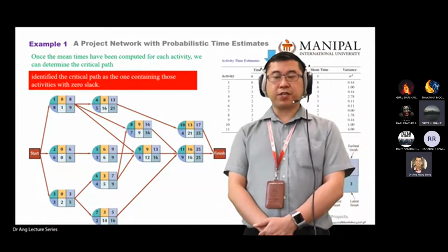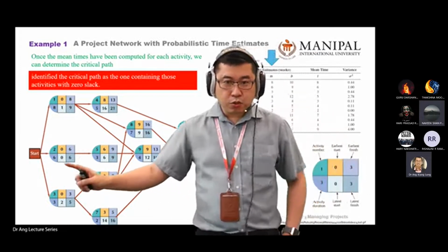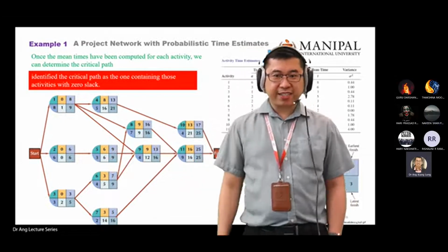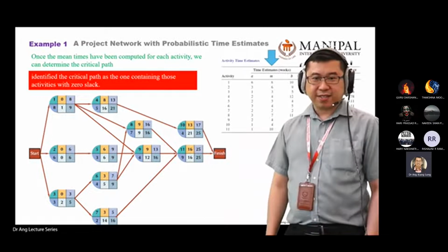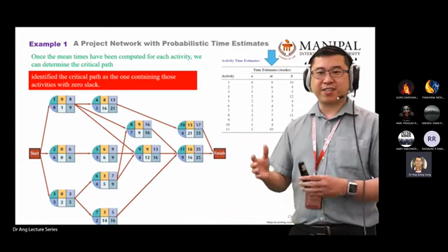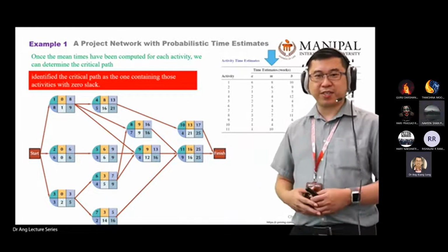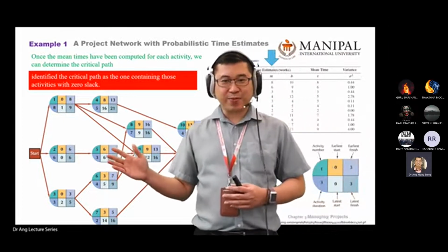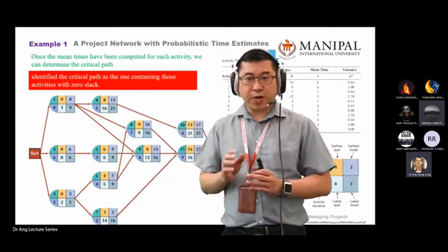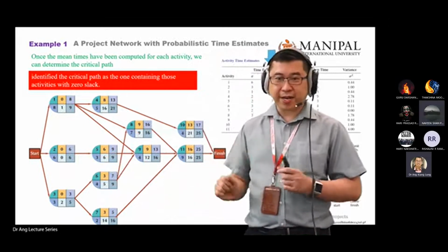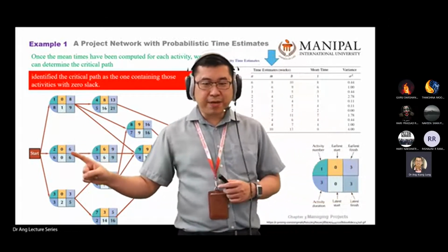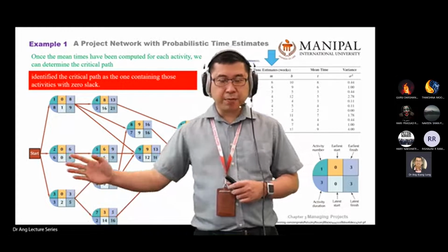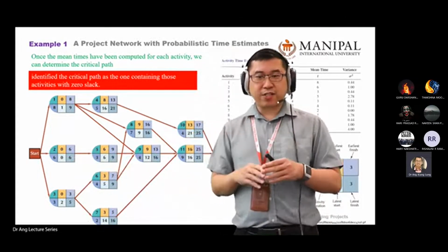Nevin, you understand what is critical? Yes, sir. 2, 5, 8, and 11, sir. 2, 5, 8, and 11. Why? What is the reason? Because that's the longest path, sir. Besides the longest path, what is the observation for critical path activity? You still remember what I asked Sarini? Yes, one way is true calculation, correct? I mean your method is correct. Do you still remember I mentioned that this one must be same with this one? Yeah, so it matched with your analysis just now.